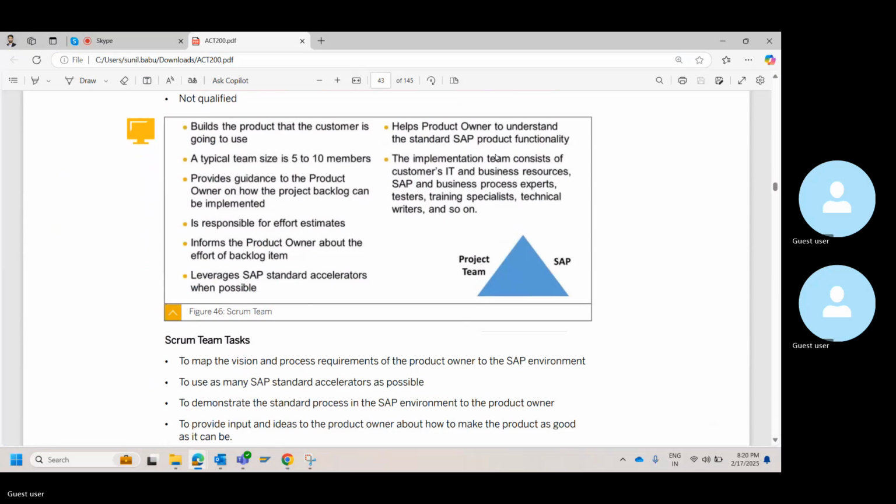Then you have one more set wherein based on country, we all will group together, module guys, and then the basis team, project manager of that country, they'll all group together. That is also a Scrum team, and we conduct Scrum of Scrums to correlate with each other for the entire operations, for the entire project execution.